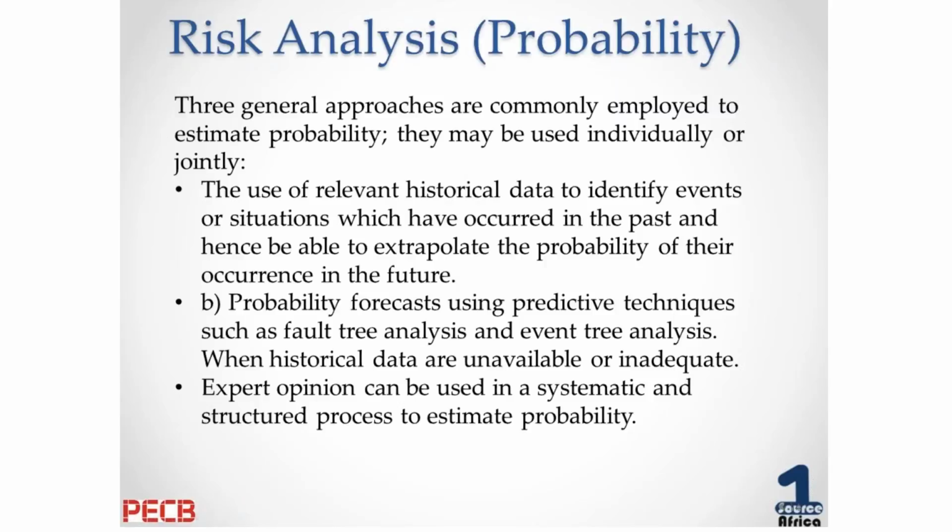If we try and define the probability or do the analysis on the probability, there are three general approaches that are most commonly employed. The use of relevant historical data to identify the events, the probability forecast, which is also known as probabilistic and non-probabilistic models, and then expert opinion can be utilized. This is where an expert is brought in to either calculate on known data or on certain models to try and depict the probability of a risk occurring.